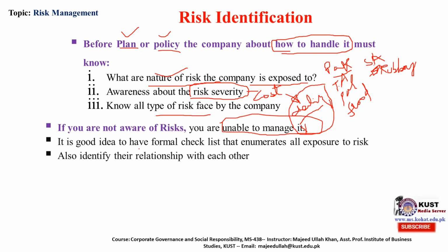It is a good idea to have a formal checklist that enumerates all exposure to risk. Also identify the relationship of one risk with another.